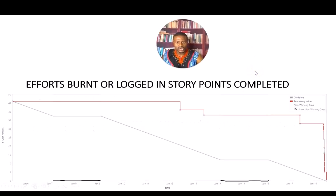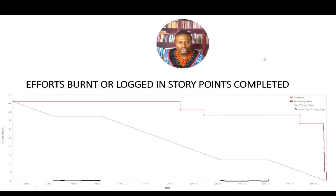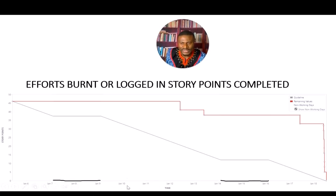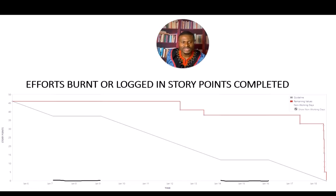On slide one, we have a team estimating their work in story points. Looking at the y-axis, it shows the amount of story points planned — this particular team committed to 46 story points in this given sprint. On the x-axis, it shows the duration of the sprint, which appears to be a two-week sprint. The gray areas represent weekends, where we don't expect any development work to happen.